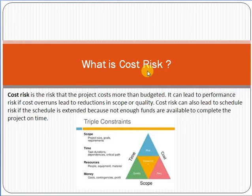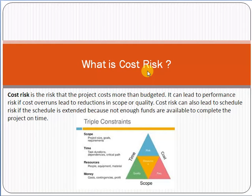Coming back to our main topic — what is cost risk? Cost risk is the risk that the project costs more than budgeted. It can lead to performance risk if cost overruns lead to a reduction in scope or quality. Cost risk can also lead to schedule risk if the schedule is extended because not enough funds are available to complete the project on time. For example, say you are assigned to implement an e-commerce solution for a company with a total budget of $5,000.